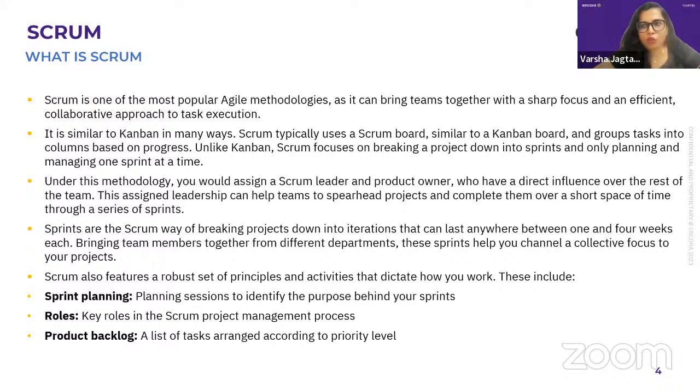So mostly we have a Scrum Master, who monitors that every process is being followed. He sees that whatever we are committed to deliver is getting delivered. He assigns and takes status every day. So in Scrum we meet daily, and daily we have a meeting where we discuss what we had done yesterday, what we are going to do today, and what is blocking us in today's review.